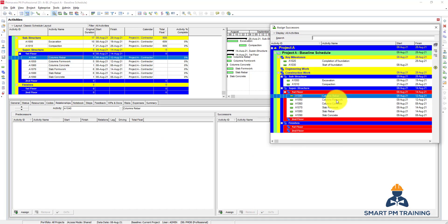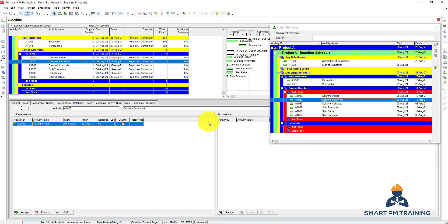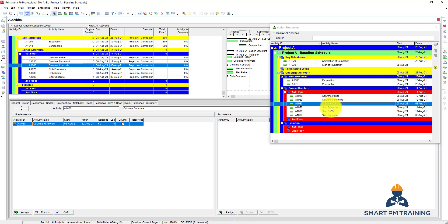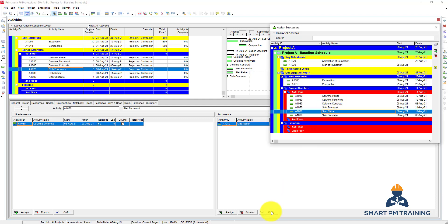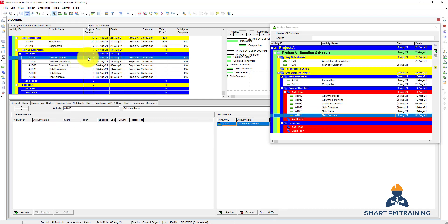I'll choose columns-formwork as a successor, and it will direct me to the column-formwork activity, then I will link to concrete, go to slab-formwork, go to slab-rebar, and go to slab-concrete. So I linked everything, but we can also have overlap between these activities. For column-rebar I will add a start-to-start and finish-to-finish relationship.